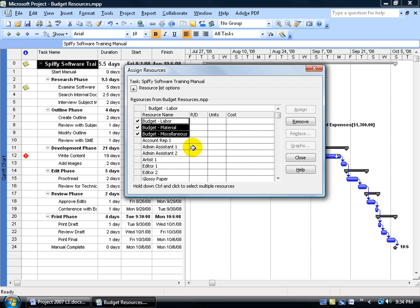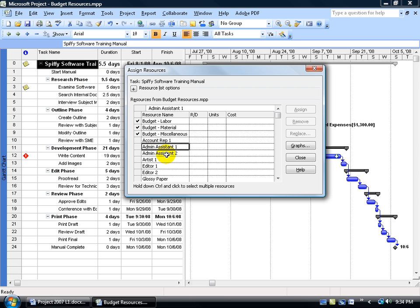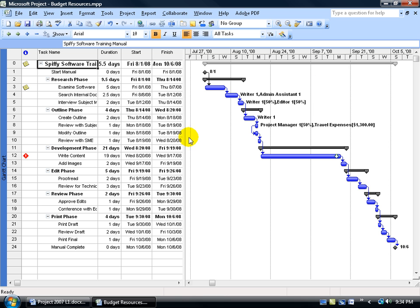As a side note, you can't assign anything but budget resources to the project summary task — you can try selecting one of the other resources, but you won't be able to assign it. Go ahead and close out. Now that we've assigned the budget resources to the project summary task, we're going to go to the Resource Usage view, and that's where we're going to assign the values to those budget resources.